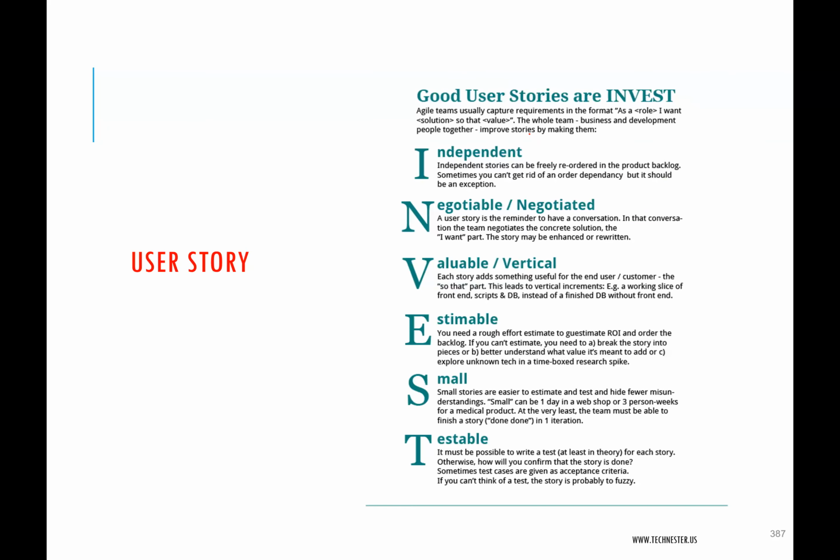So one important thing you have to know is that your user story should follow the INVEST principle. And we talked about this when we were talking about requirements. Requirements in Agile follow the INVEST principle. They should be independent. They should be negotiable. They should be valuable, estimable, small, and testable.